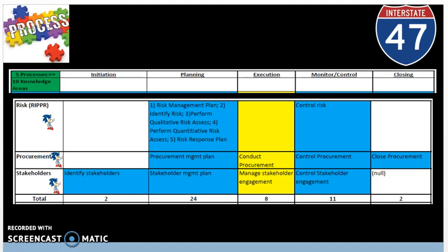In the perform quantitative risk analysis process, this is where we numerically assess the risks using the following tools, such as tornado diagrams, which is a measure of sensitivity analysis, Monte Carlo simulation, which is a computerized simulation that uses 3-point estimation, and cumulative expected monetary value or EMV analysis that sums up all scenarios with probability times impact.